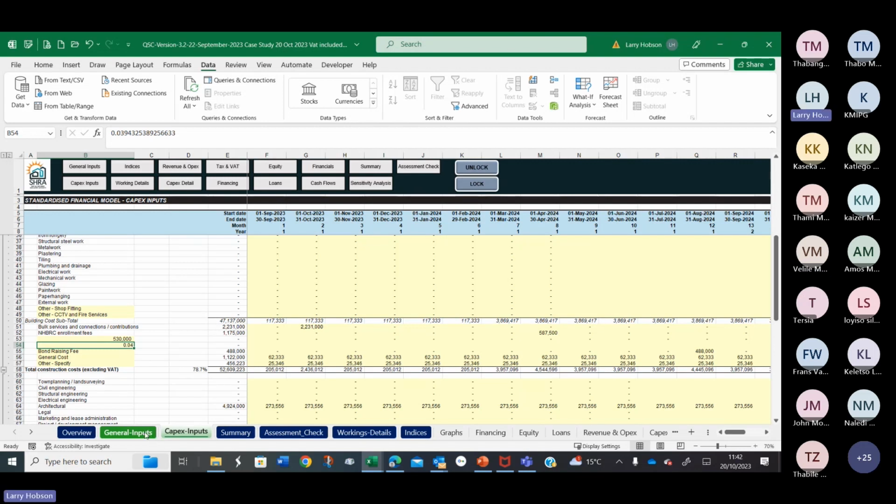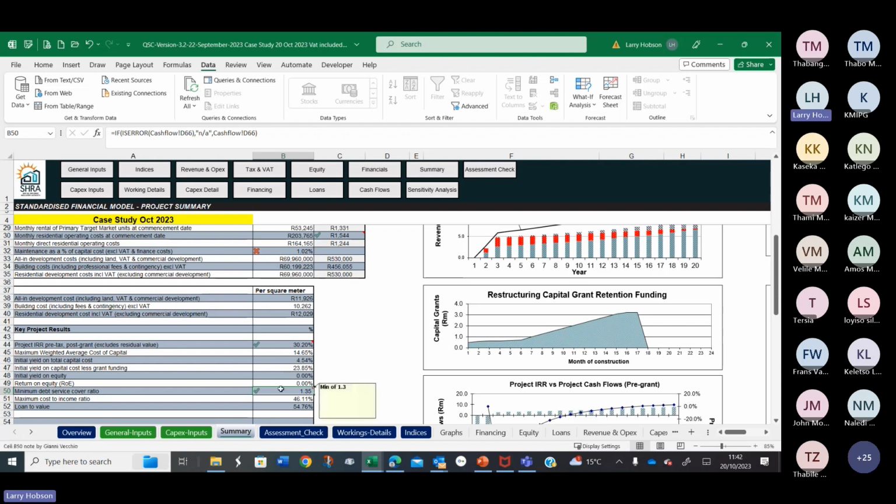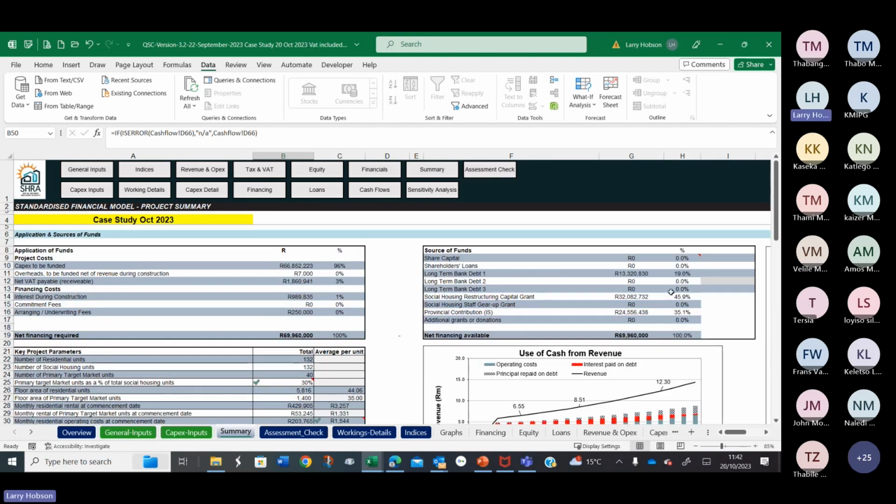So we are going back to the summary. And we have a green tick. We're at 1.35 on it. So we've beaten the 1.3 debt service cover target by reducing our development costs. Our development costs are now 530,000 when they were previously over 600,000 as an ODA.